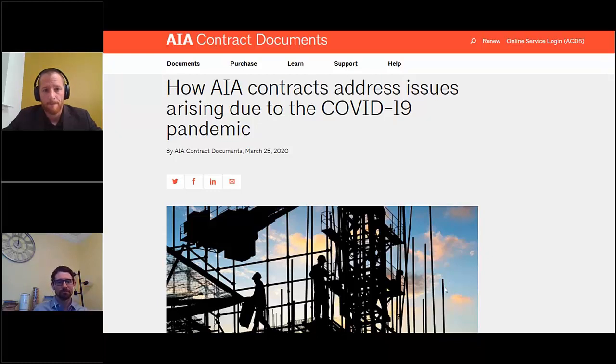Absolutely. And I'll add to that, definitely if there is a notice requirement for a claim for additional time or compensation due to a delay, make sure that you're following the letter of your contract for any notice requirements. Also, it's one thing to be entitled to additional compensation and time for a delay. It's another thing to be able to prove it in a way that doesn't cause conflict. Document all of these delays, and make sure that you are separating out your regular costs and your regular scheduling issues from the things that are truly caused by a delay when it comes time to actually get compensation or an extension of time from an owner.